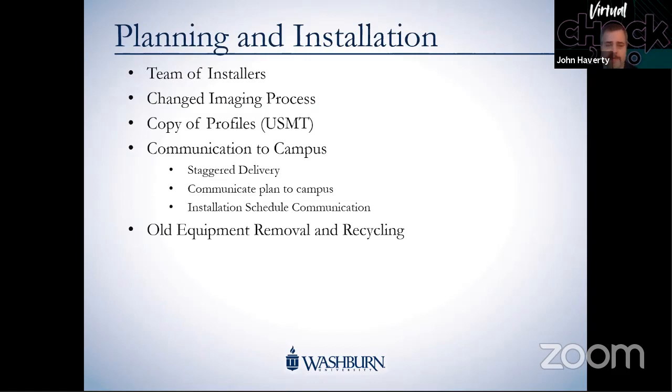The processes they include, again, go down to imaging computers. These computers are coming in with nothing on them. We had to figure out where we were going to be imaging lots of computers. We decided to do it on our dock over in Henderson, and tagging computers. Not only putting our labels on there, but of course inventory has to come in and put labels on and that type of thing. So it's quite the process to unbox everything and put labels on, and our inventory control clerk would do that just with computers.